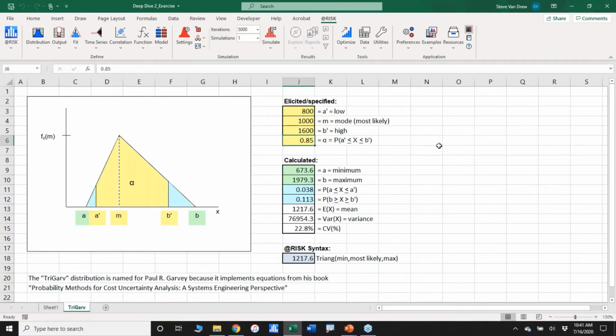Do we just divide it in half and put half below and half above the old low and high? And that's kind of the way Dakota, I think, has been taught to do it. The Air Force didn't say to do that. The Air Force's guidance said, find a new minimum, call it just A, find a new maximum B, so that the original skew is maintained for this triangle.